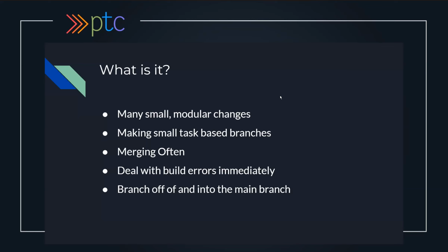Well, you try and break that down into the smallest tasks you possibly can. So one task might be create a class for the arrow, right? Then another one might be create the bow inventory item. Then another one might be add the shooting to the bow inventory item. Then you might even break it down even more and say, well, add the arrow hitting an enemy, right? And all those would be separate tasks that you'd make, that you complete and merge back into the main separately.